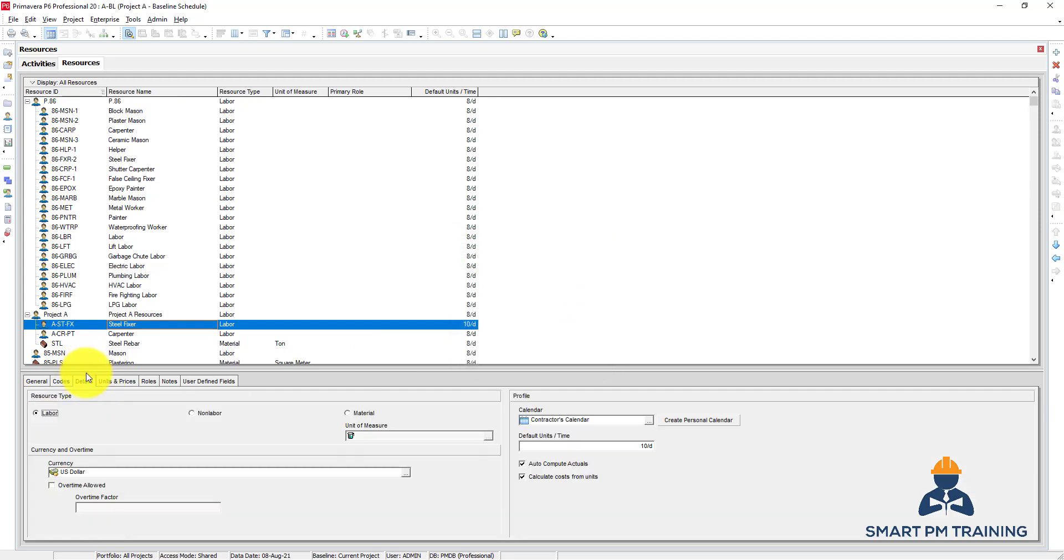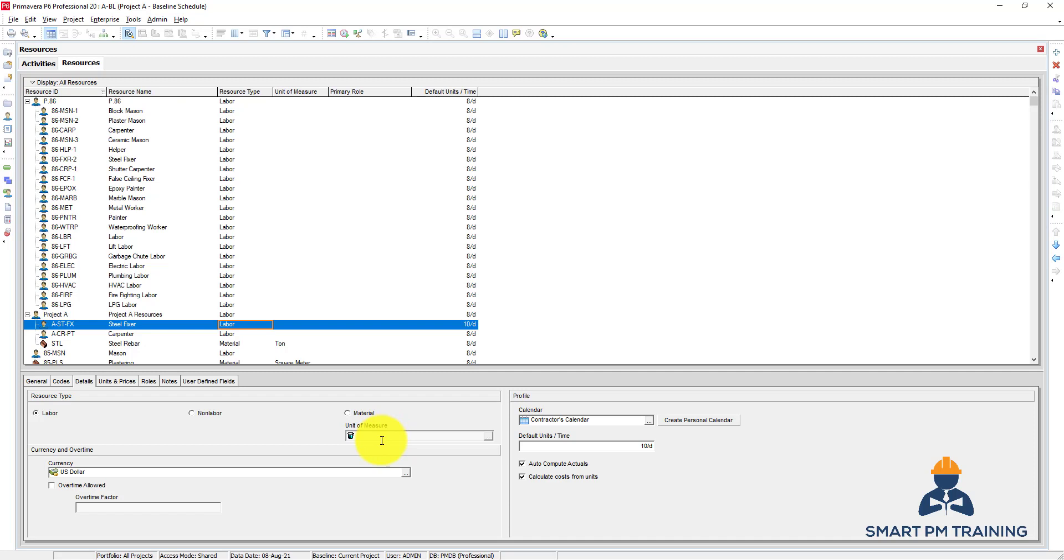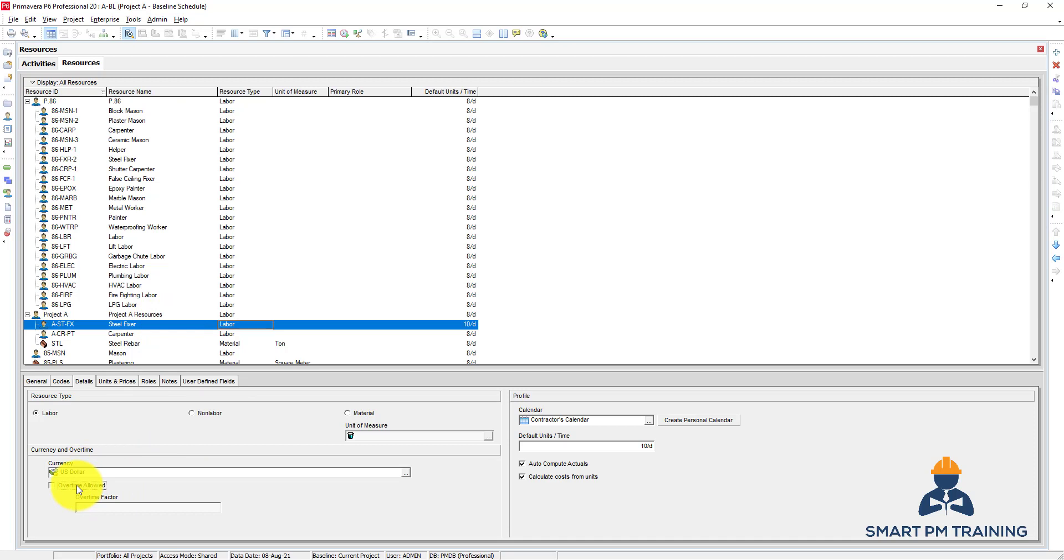For Details, you can also change the type - you can change it here or from the drop-down menu here. The unit of measure only applies for materials, not for labors - square meter or ton, it's only for materials. The currency you can keep as the project currency, or maybe you can have different currency if you want. And overtime allowed - so if you click on it you can edit here the overtime factor. So is it 20 percent overtime? This will reflect into cost as well.